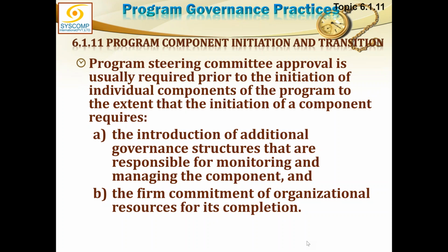And the second requirement is the firm commitment of the organizational resources for its completion. That is why the charter is developed. Firm commitment, a proper charter has been issued. So a firm commitment by the organization resources. So two things you have to provide to start any project within the program or a component within the program. One is a governance structure and the other is a charter.